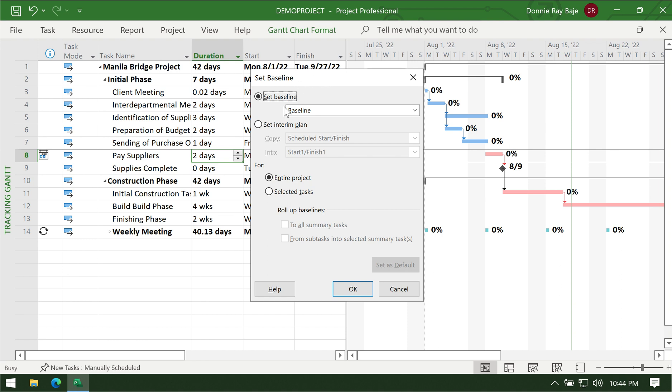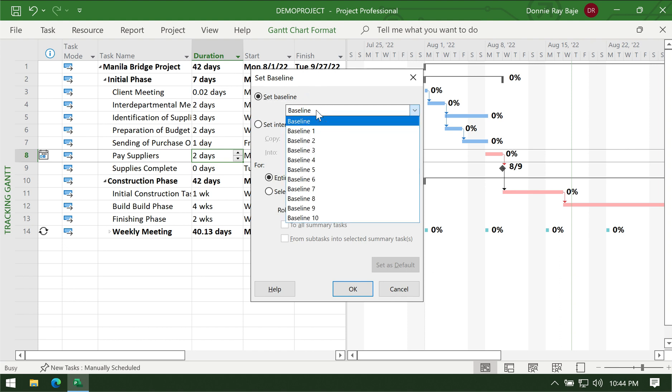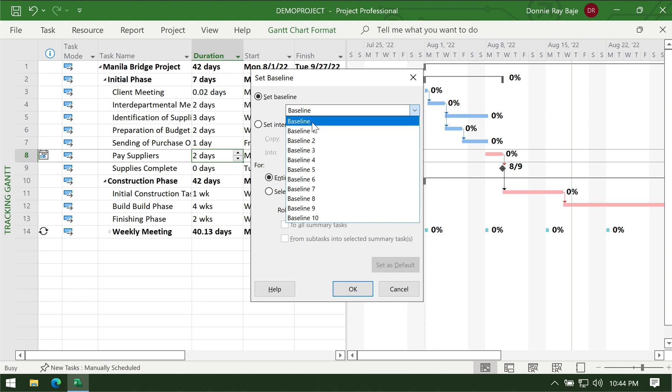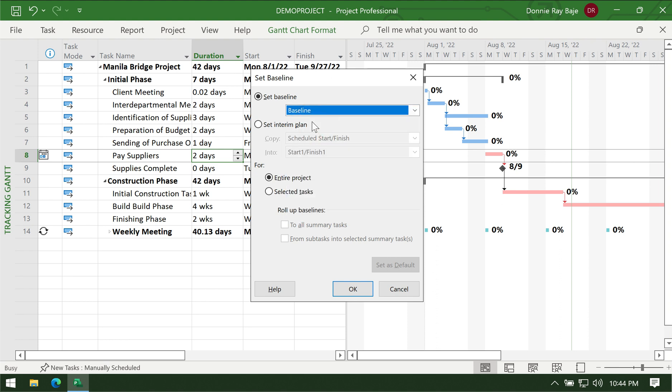You're going to set the baseline and that's it, you're already good to go here. But to let you know, you can have several baselines, like several plans across your project. So let's say this is my first plan and then maybe later I can come up with another baseline. For now I'll just stick with one baseline.